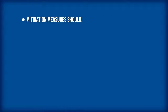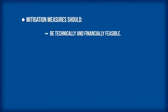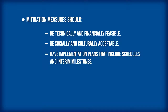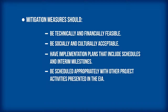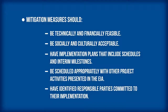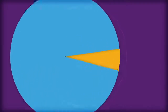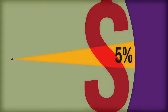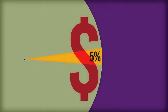Mitigation measures should be technically and financially feasible, with adequate financial and non-financial resources available for implementation. They should be socially and culturally acceptable, have implementation plans that include schedules and interim milestones, be scheduled appropriately with other project activities, and have identified responsible parties committed to their implementation. Remember, avoiding the last 5% of the impacts can be more costly than avoiding all of the other impacts combined — and this is where compensation comes into play.